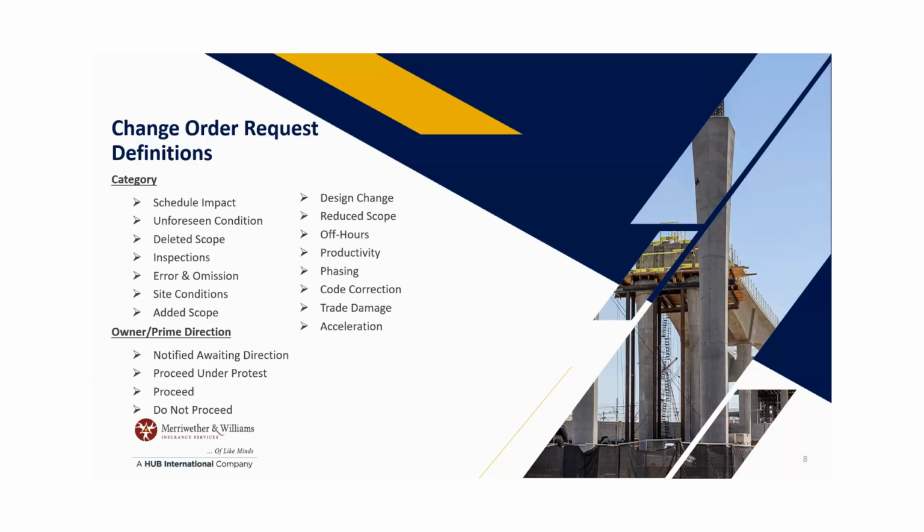I'll say this, communication is key to everything. It may not solve the issue, but it gives you room for argument later. I had a situation where we were doing a design build for this major building, and they were ordering product from out of the country. There were delays, nothing to do with us. What we didn't know is that wherever this product was coming from, I think it was Spain, they shut down production all of August. Nobody's in there all of August.